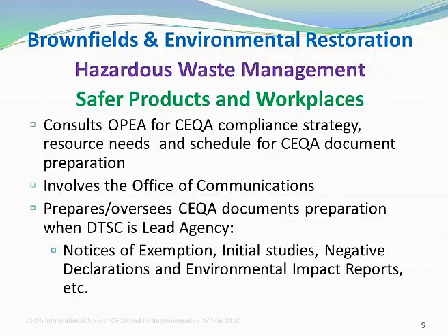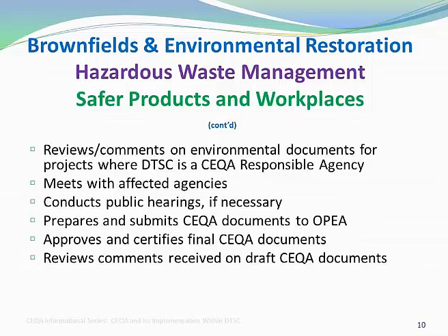Preparing or overseeing the development of draft CEQA environmental assessment documents for projects where DTSC is the lead agency, including notices of exemptions, initial studies, negative declarations, and environmental impact reports. Program staff also reviews and comments on CEQA documents for projects where DTSC is a responsible agency, as in the case of a redevelopment plan for a contaminated site, a school site project, or a conditional use permit.